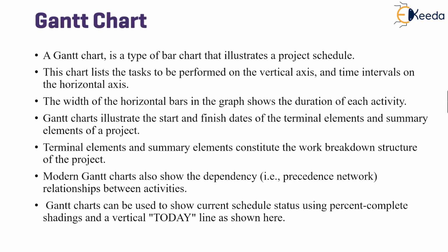Modern Gantt charts show the dependency, that is, the precedence network relationship between these activities. Also, Gantt charts can be used to show current schedule status, percentage complete, etc. by adding a vertical today line. We will see the examples at the end of this video.